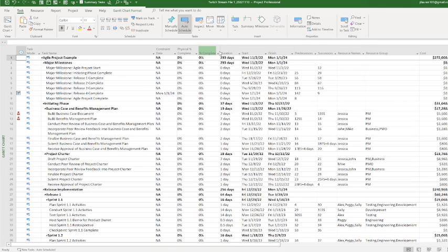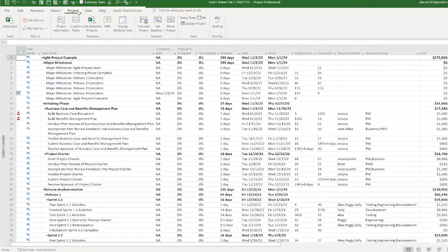basically our statusing. So first things first, and I think it's in, yes, projects. So to set the status date, the best practice is always status for a week. Never try to go beyond, like forecasting like the next 2 weeks. One of the things I notice with project managers, CAMs, whatever the name is for them, project leads, tech leads, whatever their title, what I've seen consistently is that they're only concerned about what they're doing currently, which is the current week.